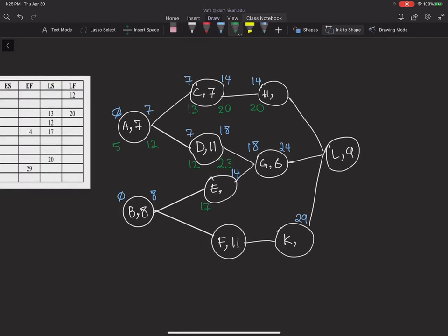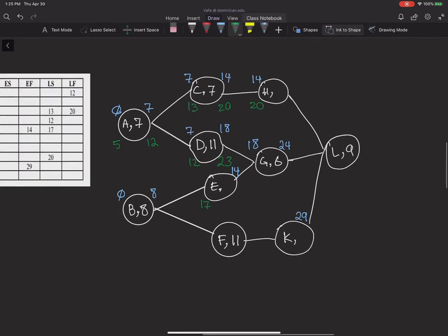Okay. So pay attention here. I know that late finish is 23. I can conclude that late start of activity G was 23 that has been transferred to late finish of activity D. Okay, by the same rubric, I can say that the late finish for activity E as well is 23. Okay, so this part was pretty important.